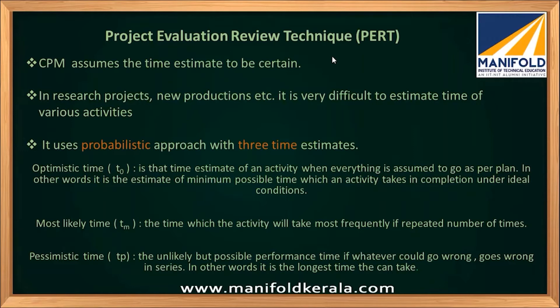That maximum time is the pessimistic time. Don't confuse it with the latest finishing time — it has nothing to do with earliest start or latest finish. We are talking about the duration of an activity that can change if something is going wrong. It is not a specific network-schedule time.